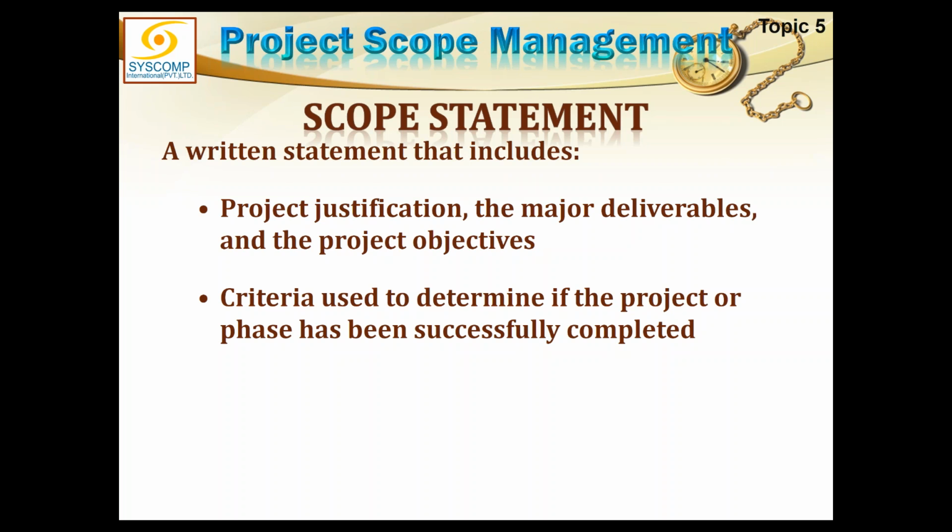I say I have to construct this house, and this house will be done in 3 phases. First phase is all the work which is done underground. Then I'll do the superstructure, that is the second phase, and third is the finishing of the building, all the electrical circuits and everything, till finishing. So if these are my three phases, then each phase has to be further broken down to a comfortable level where I can monitor and control my project.